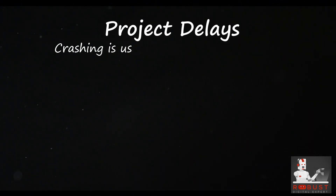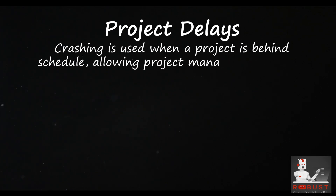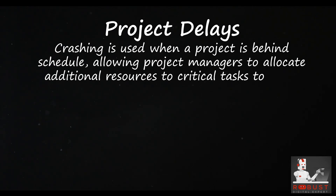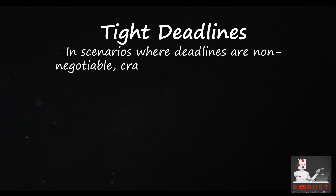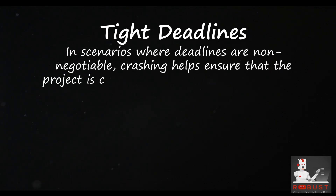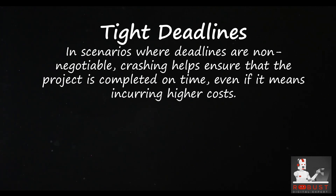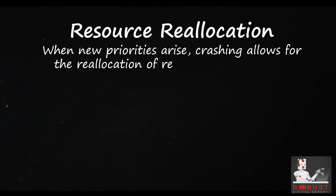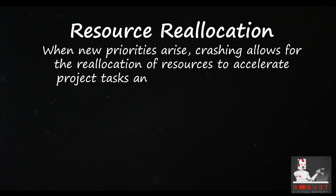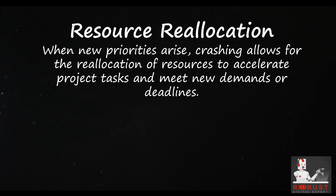Usage — Project delays: Crashing is used when a project is behind schedule, allowing project managers to allocate additional resources to critical tasks to catch up. Tight deadlines: In scenarios where deadlines are non-negotiable, crashing helps ensure that the project is completed on time, even if it means incurring higher costs. Resource reallocation: When new priorities arise, crashing allows for the reallocation of resources to accelerate project tasks and meet new demands or deadlines.